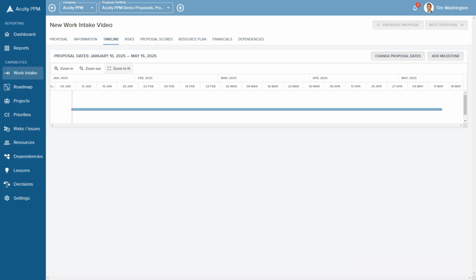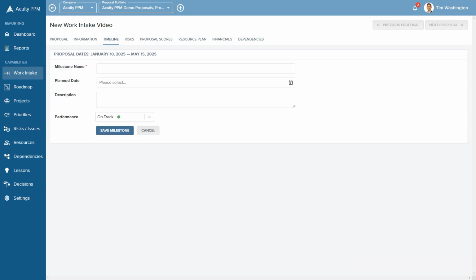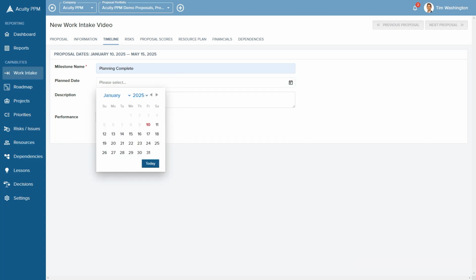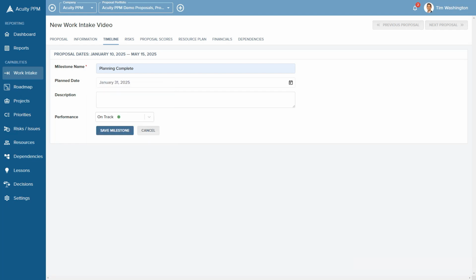We'll have more information in timeline and schedule videos, but we can add a milestone. Maybe it's going to be planning complete, and maybe I'm going to push this out by the end of the month. So the assumption is we're going to put in a few key milestones for our project on the assumption that it gets approved and can start based on the requested start date. You can add additional information to the description field that will show up when hovering over the milestone.